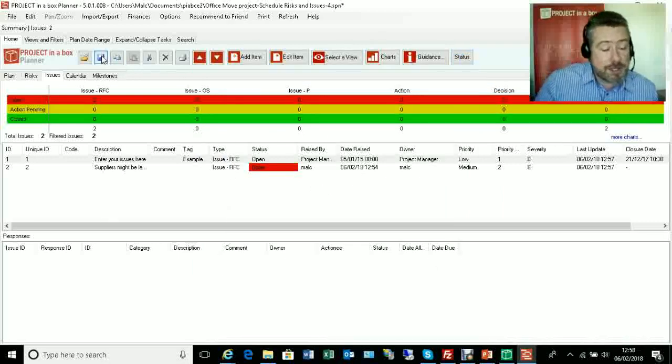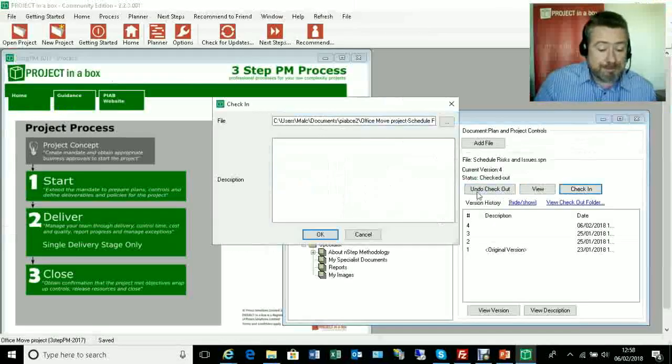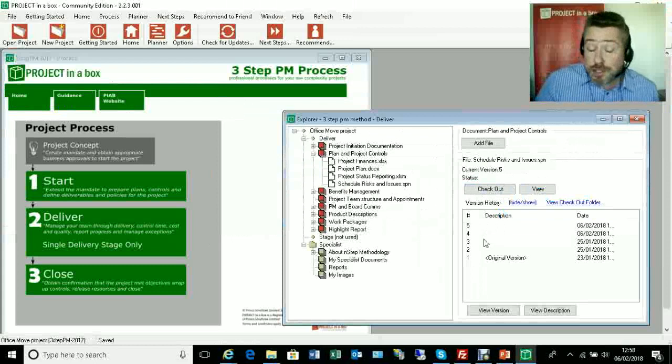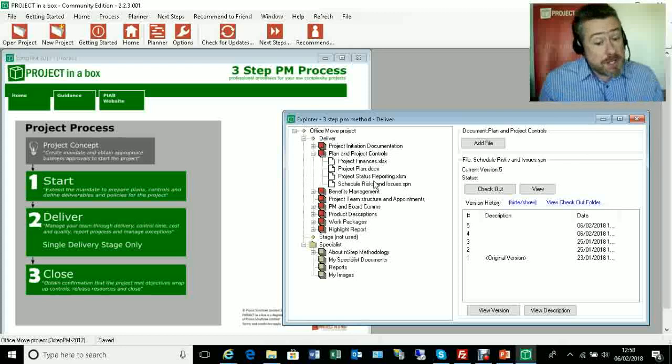So we can make our changes to the register here, just save, close, check it back in. It's going to keep the versions for us, and in fact if we want to go back and look at earlier versions, we can come back and see that, and of course we might have updated the plan while we're at it, etc. If we are making changes, of course, linking back to our previous delivery and acceptance session, we need to think about making sure that documentation of the change is brought down into the other sources.